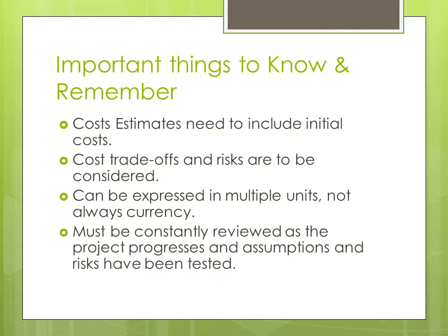The project costs estimated can also sometimes be calculated not always in a currency. They are often in the currency which the company uses, but sometimes they can be placed in working hours or labour hours, which eliminates the fluctuation of the currency that's normally used. That way, further down the track, when it's exactly required, it can be easily changed into the cost at that point in time.